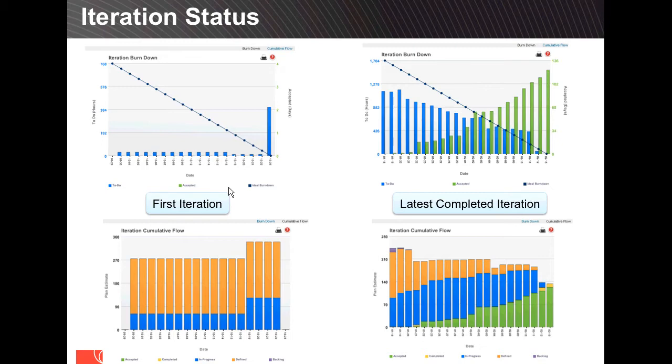But ideally, you've got the major part of your plan done for the iteration early on, and that way you can track it. And that's a good point. So that top chart, the blue is based on task hours. And interestingly, you do have to be kind of aware of this when you interpret this chart, the right-hand side is story points. So those two scales are different. One is task hours, one is story points. And the right-hand side is representing the accepted work, so that as stories are finished, they'll be counted there.